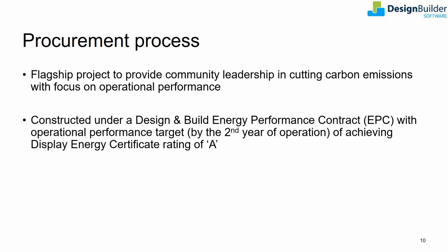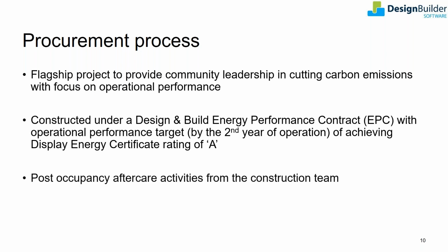Due to this, the building was procured under a design and build energy performance contract, which required the building to achieve an A rating under UK's Display Energy Certificate scheme, which compares operational performance of UK buildings against other similar buildings. This made the design and construction team responsible for energy performance of the building even during the operational stage.